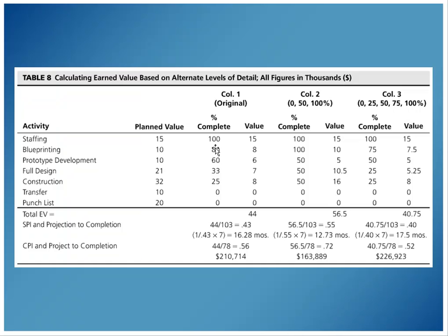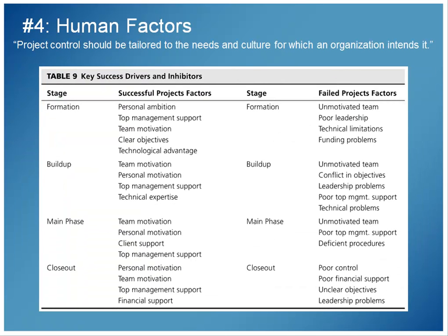Going back to our original 80, 80 maps closest to 75, 60 maps closest to 50 of our choices, 0, 25, 50, 75, and 100. 33 maps closest to 25, 25, 25, 0, 0. This gives us something that's actually more expensive and longer than what we had originally. So the point is that getting accurate percentages is going to have follow-up effects, rippling effects on your prediction, and is very important when you're doing this kind of model. Okay, so I said that was going to be where we spent the bulk of our time.